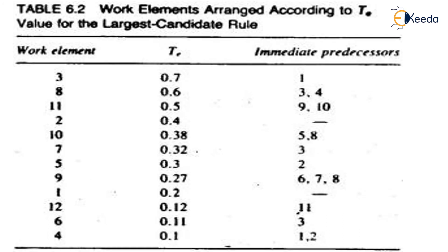For example, with work elements 1 to 12, arranged in descending order by task time: element 3 is first at 0.7, element 8 at 0.6, element 11 at 0.5, element 2 at 0.4, element 10 at 0.38, element 7 at 0.32, element 5 at 0.3, element 9 at 0.27, element 1 at 0.2, element 12 at 0.12, element 6 at 0.11, and element 4 at 0.1. Immediate predecessors are also determined from these values.